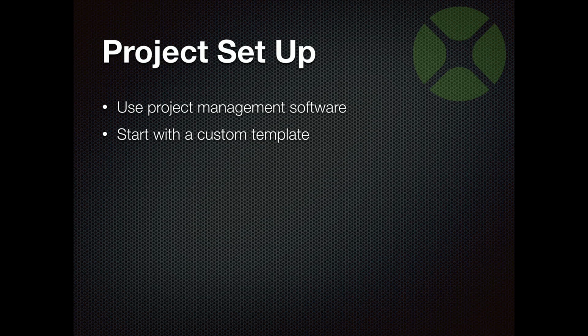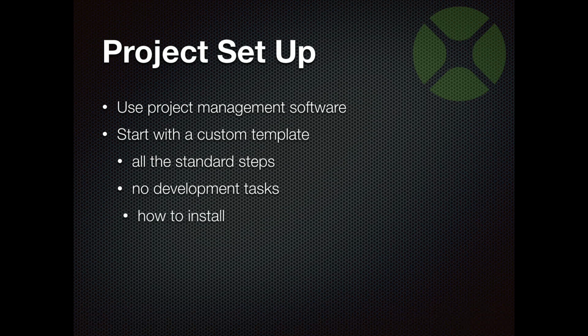Start with a custom template. So what goes in your template? All of the standard steps surrounding a project, but your template is not going to include the steps for the actual development. There's no development task. It's all of the things about, okay, how do you install the software? Do you have licensing? Do you have to remind yourself to renew their licenses down the road?